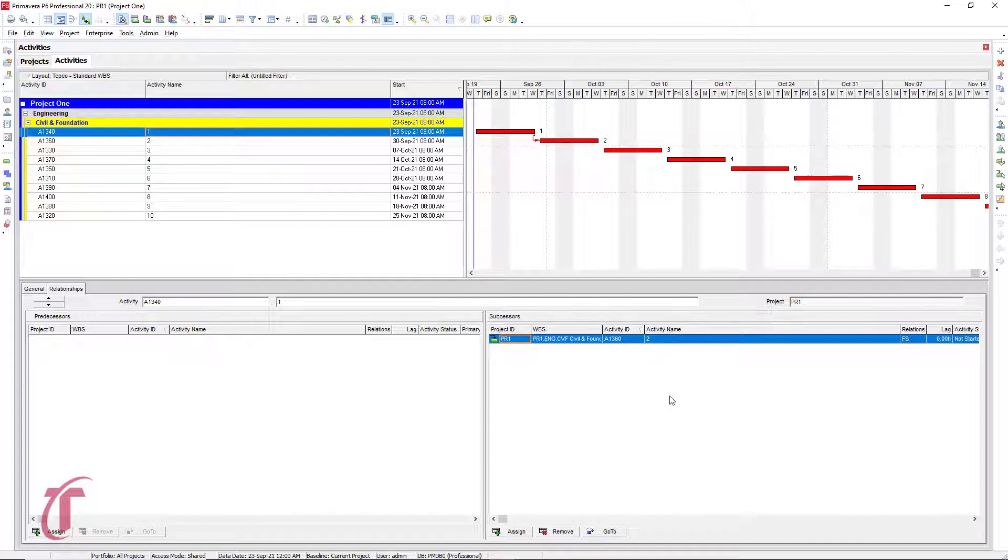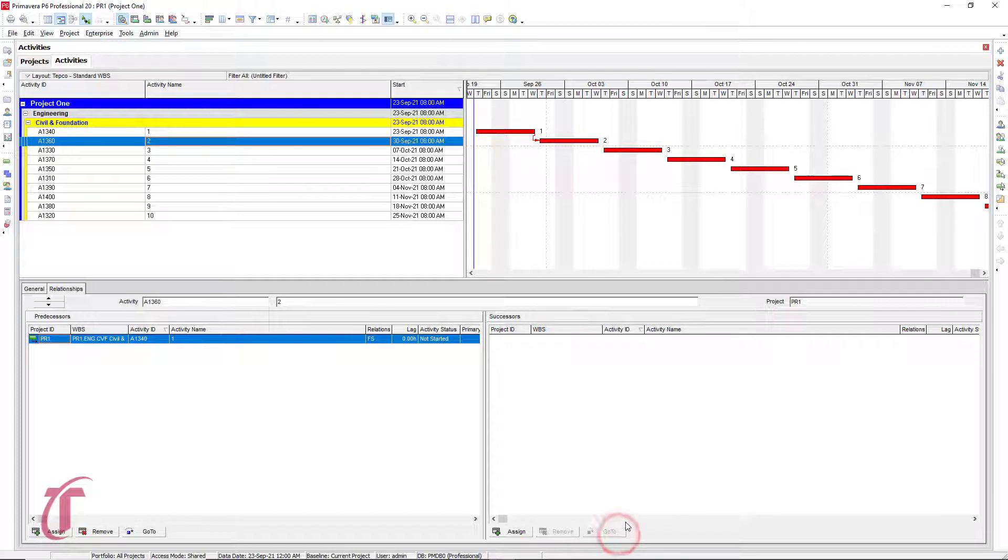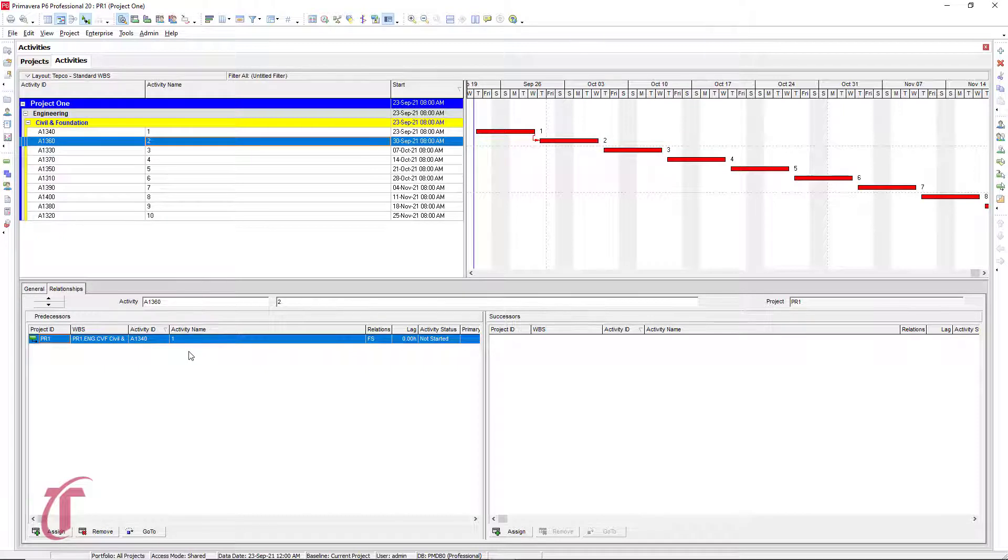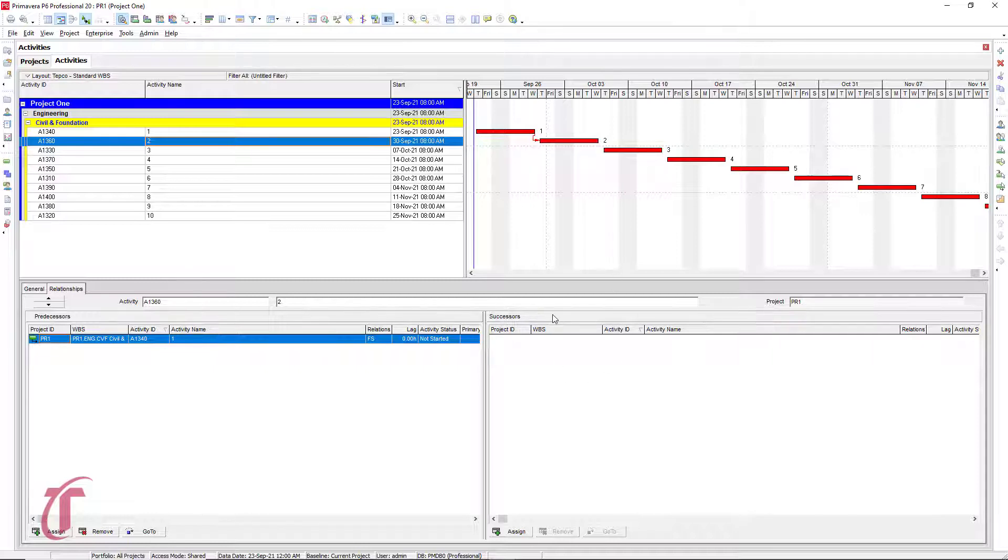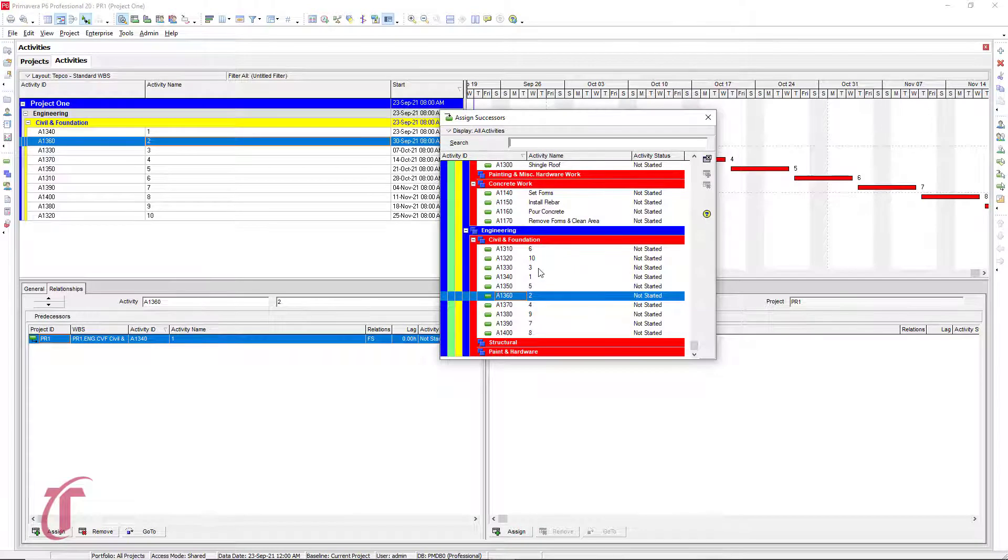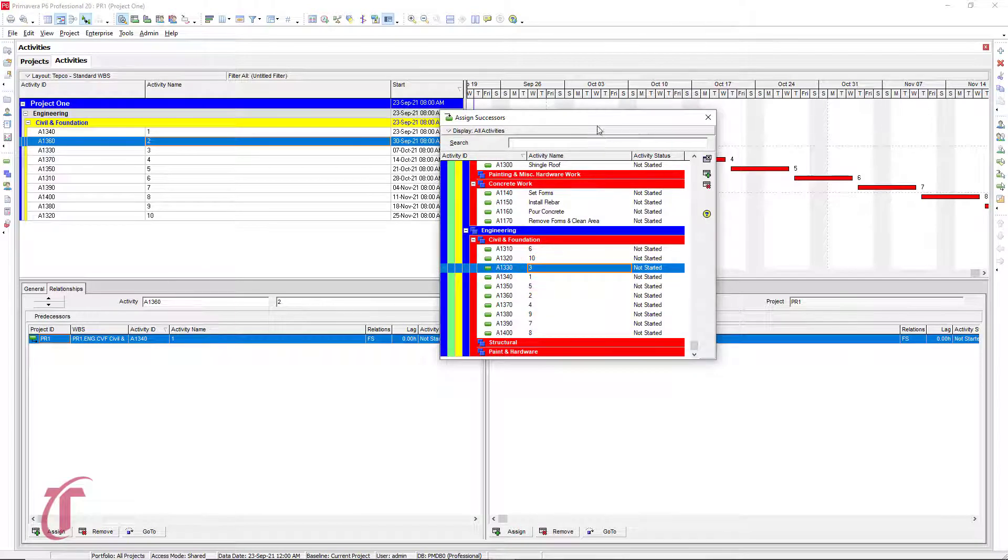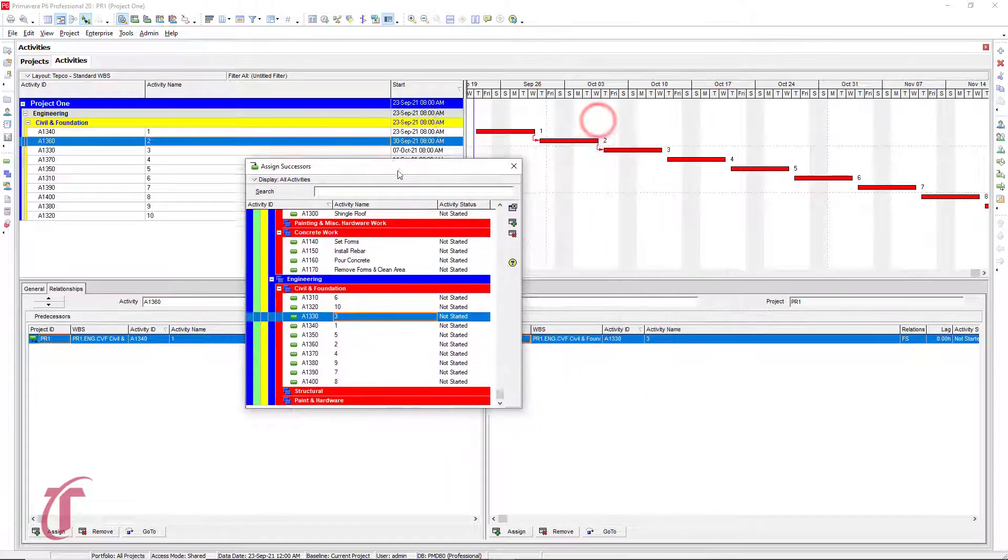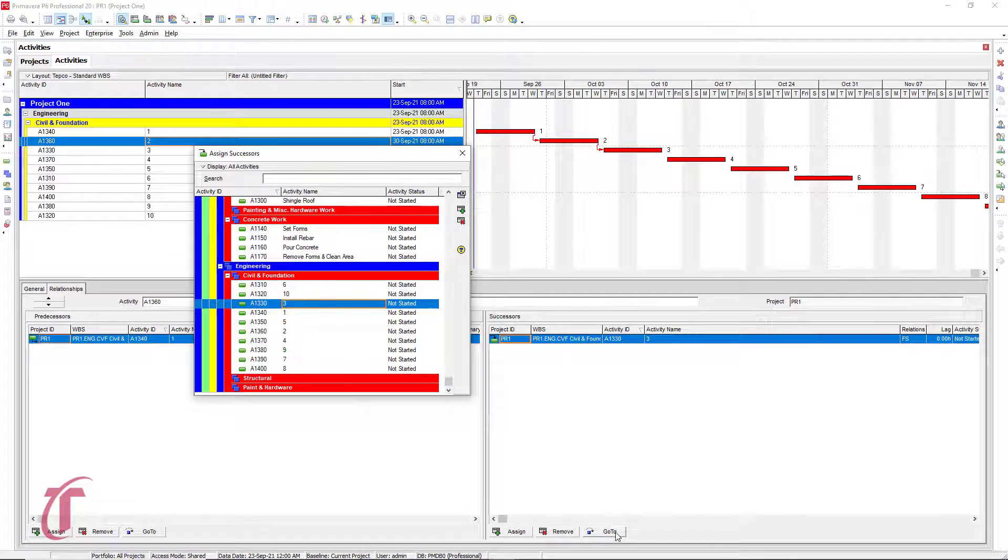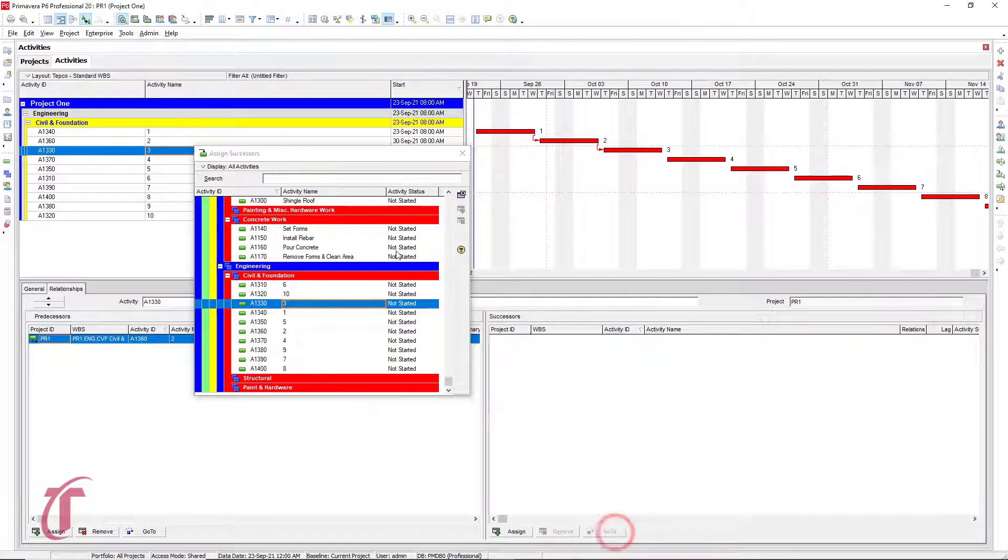And so what we can do to move through this is at the bottom, we have this go to button. If we click on that, notice we are now highlighted on activity two. We can also see that we're in activity two right here. Our predecessor, so the activity before activity two is one. And we need to make our successor activity three. So in our successors box, click assign, we're going to select three by double clicking. We can leave this open, click on go to.